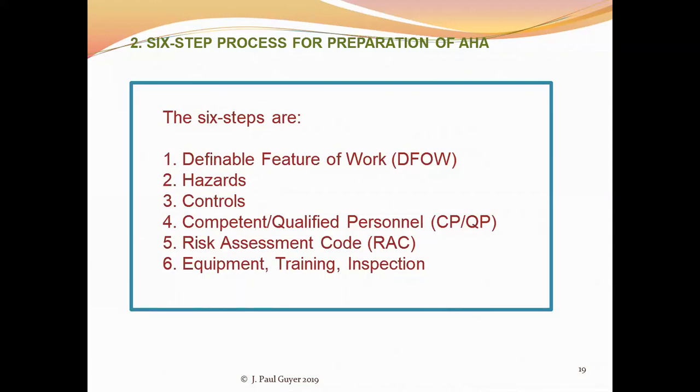That is broken down into tasks, and then each task is broken down into steps. And it's for each one of those steps that you identify the hazards, the controls, equipment, inspections, procedures, and you